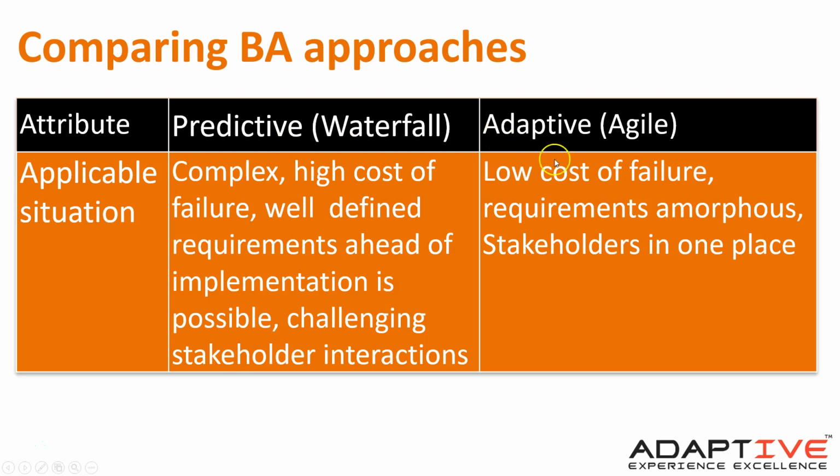So even if you have a complex, high cost of failure, risky thing that's regulated, you can do the upfront planning and then implement adaptively, right? So just going full out adaptive, you don't want to do that at all if it's complex, critical, high cost of failure stuff that's regulated, could get you fined, get you shut out of business.